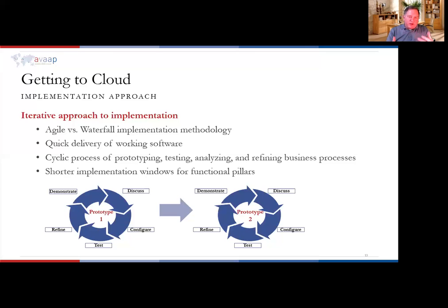Well, there's sort of a hybrid of that with the cloud, where you're actually doing this iterative approach, where you're creating a prototype, you're talking about it. Okay, you're seeing if there are gaps, then you go back, you change some of the configuration, you show another prototype. So first you may be 70% there, the next prototype may be 85% there, the next prototype may be 95% there, and then you're getting ready for that last build where you're getting ready to go into production perhaps.